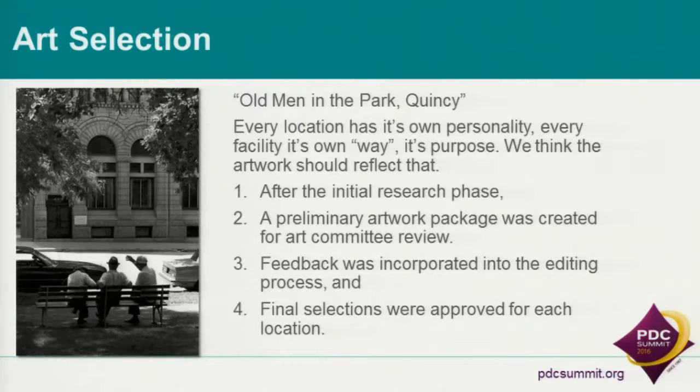And even the prototype room, when I was talking about the proportions, we had large paper copies made to try out a few times without spending a lot of money on the art, but at least try some sizes and shapes. Those were shared with senior leadership, or we had them up for a couple of days so folks could check them out. Yeah, this was really a slow track process, as you can see from that schedule. And we did prototype rooms, we had mock-ups, a lot of choices and opportunities to make decisions with the senior leadership as well.